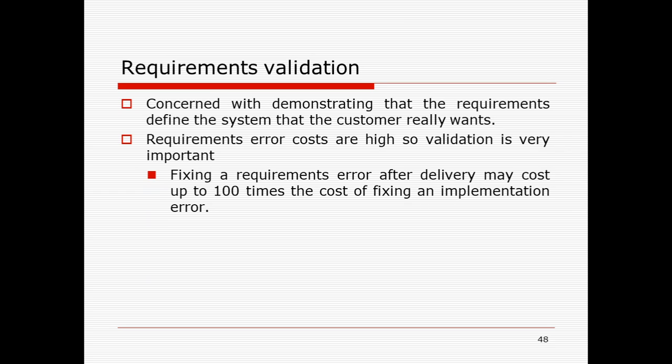So requirement validation is a very important step, because if your requirements are validated, then the errors are likely to be fewer. If requirements are not properly validated, then there is likely to be an error in the requirements, and in the later phase you may find the requirement error in the system. So ultimately there will be a huge amount of additional cost in the final system.